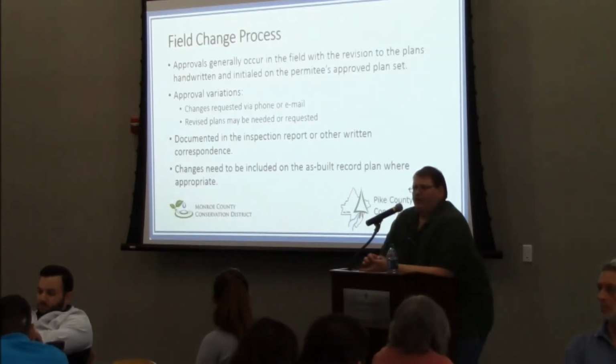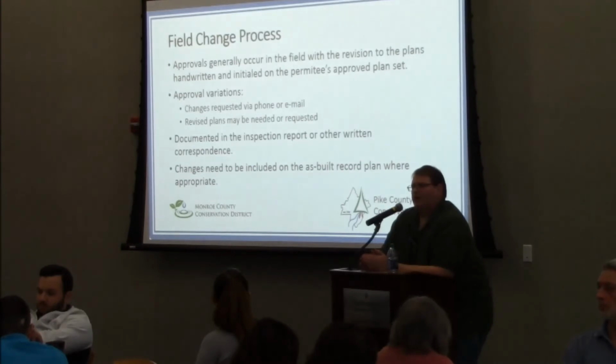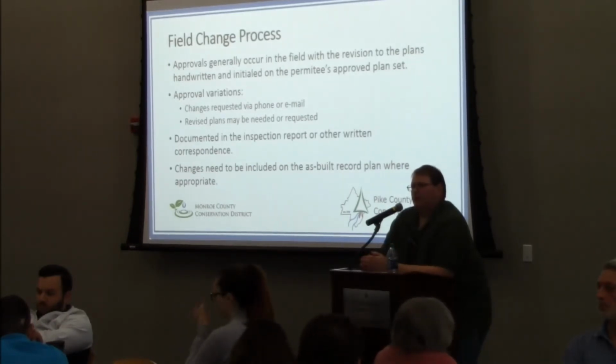And this is a big one. You'll see this as a common theme as we go through every type of amendment. All the changes need to be included on an as-built record plan where appropriate.